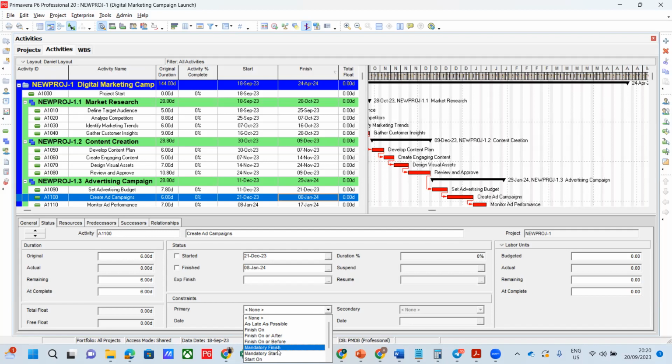So the sequence of activity that is linked to that activity, you will force them onto the critical path. You will make them, because you said they must finish, and it will just suck up all the floats. And that's why when you use it, some of the activity that is linked to that activity becomes red. You noticed that, did you? Yeah. Because you are saying they will definitely be done on that day. So, but the bottom line is you got the concept, and I'm happy about that.